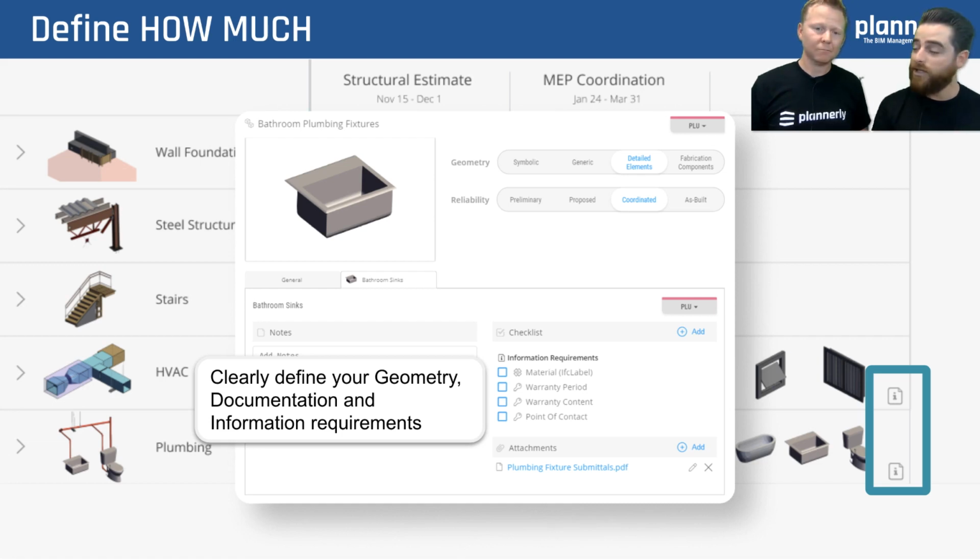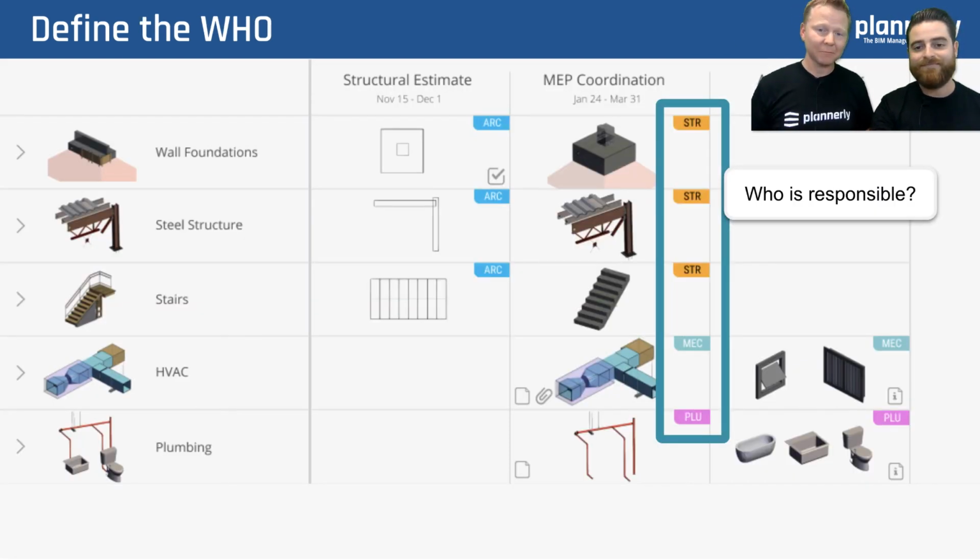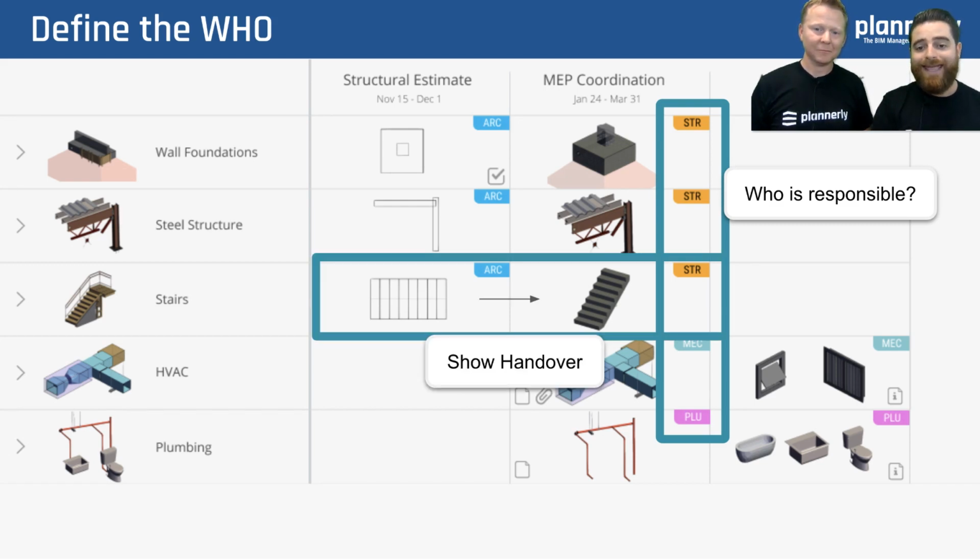And actually, this really leads into more of a lean scope approach. Packaging those requirements per model use and making sure that we know precisely, rather than in an abstract way, exactly what's required. And finally, you want to define who's responsible for that scope. And whether it's on a different milestone, whether it's the type of scope that you've added, you want to define that very clearly. And using a scope grid, you'll actually be able to share when those handovers take place.